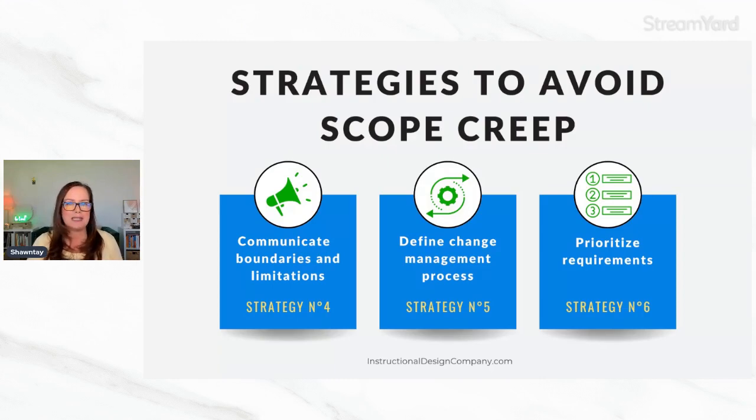I think one of the biggest things is that early upfront, we define those requirements, we communicate those requirements to everybody, we send it out by email, it is documented. We have check-in meetings along the way to let people know where we are in the process. When somebody tries to throw in added scope, and they will 100% of the time, you be prepared as the instructional designer to say, yes, but, or no, not right now, but in B.2, we can do that.